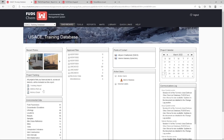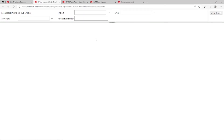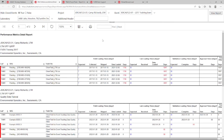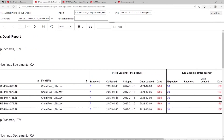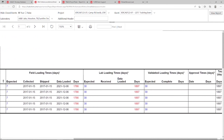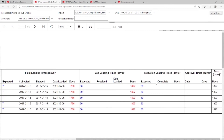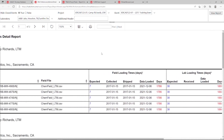A set of Performance Metrics reports is also available on the dashboard to track the amount of time passed for loading field data, loading lab data, validating data, and approving data. This report can be customized to show project-specific expected loading times if the default timeframe is not appropriate for your project. Refer to our Performance Metrics Reports Overview for more information.